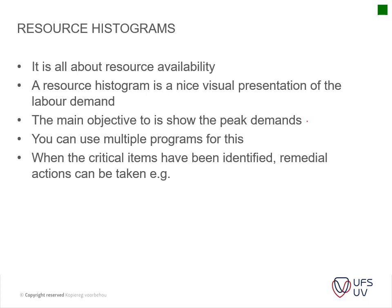In the winter school, we're actually going to do resource allocation in Microsoft Projects. When the critical items have been identified, remedial actions have to be taken — for example, appointing more people, getting more machinery, or just letting the project run for longer. Those are the types of options that you have.